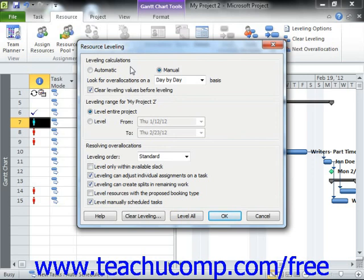Note that the settings that you make here will be applied to all project files that you use, and not just the currently selected project file. For this reason, it is recommended that you do not select the automatic choice within the Resource Leveling dialog box, as that will apply resource leveling in all project files whether you want it or not, which can cause more problems than it corrects.